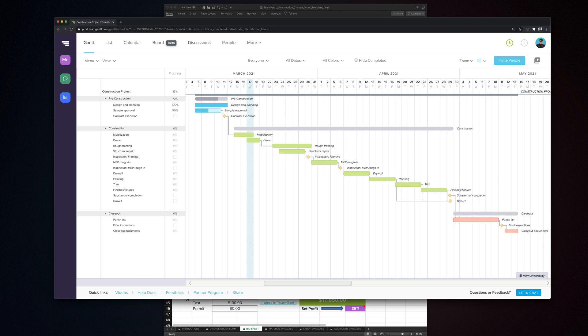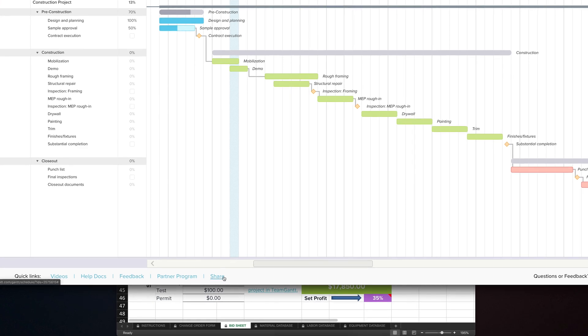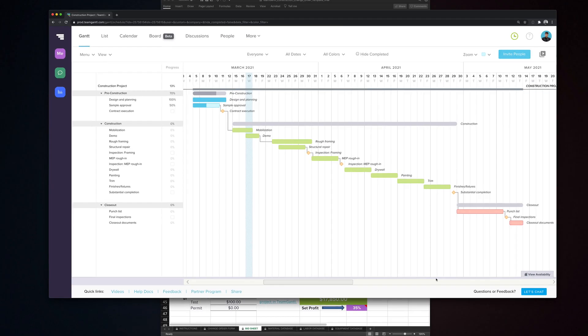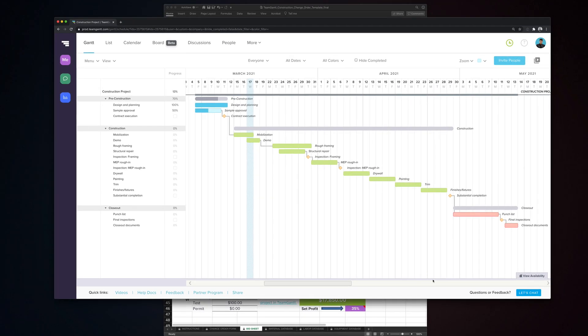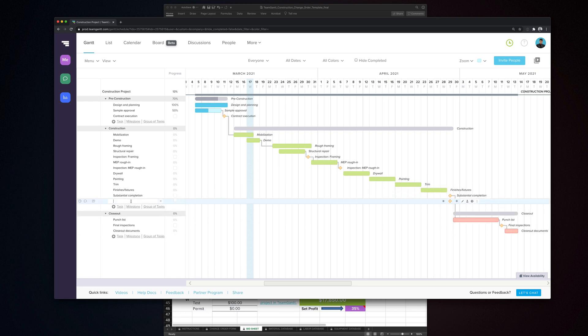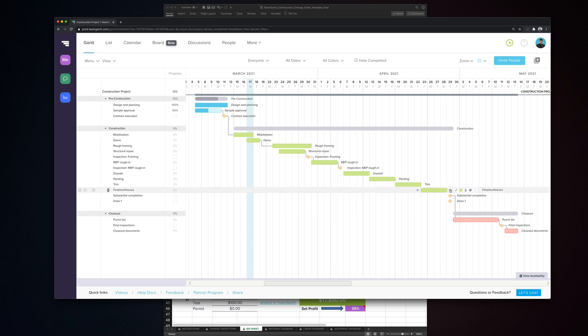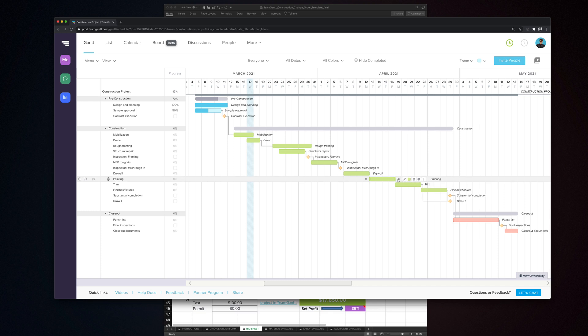Here's the best part. If you're anything like I was, you're probably running around from job to job all day. And the last thing you need is to have to constantly keep a nagging customer up to date with what the job's progress is. Well, you can share your TeamGantt project with them, and now they can follow along. That alone has got to eliminate most of your calls and emails. What a headache those are. But one you don't have to worry about anymore. Another cool thing you can do is set milestones for the ends of phases in your project. So, say you're a residential contractor, and you're working on a 203k rehab project. If you know that you need to complete this group of tasks before you can request your next draw, set a milestone for it. Make it dependent on completing those tasks so everyone knows what needs to get done to get to that draw. And if you're sharing your plan with your customer, they know it's coming too, so things won't get held up on their end either.